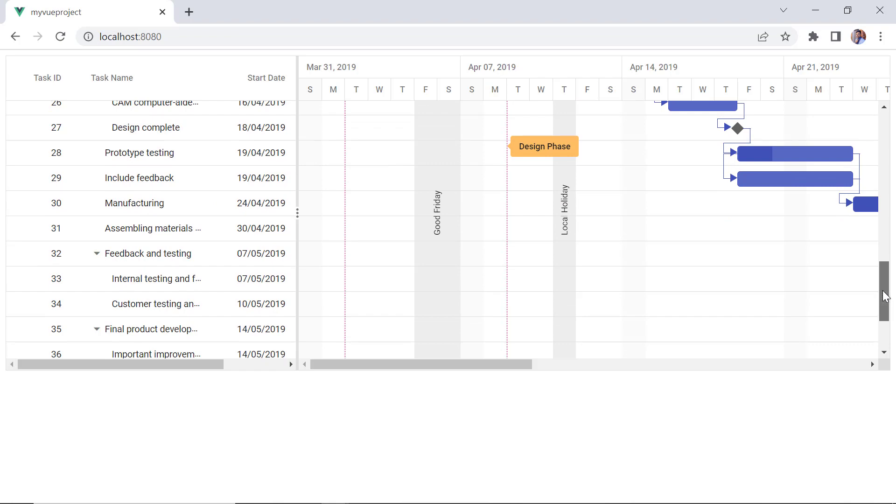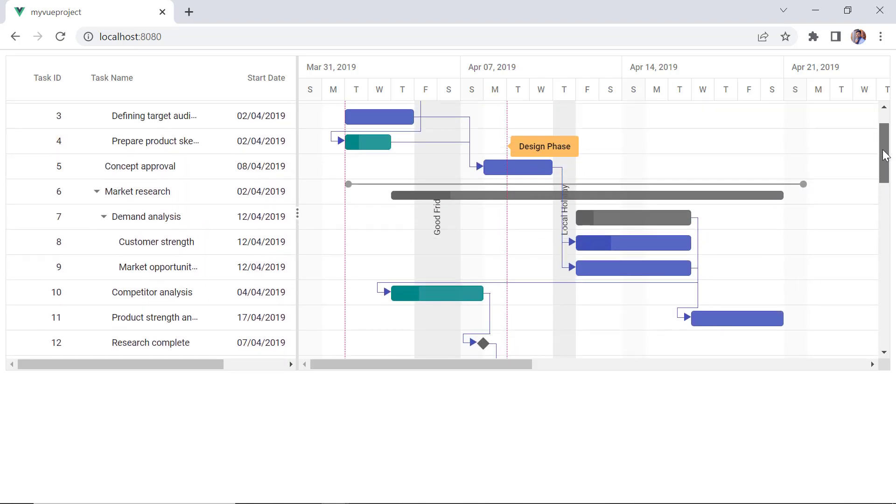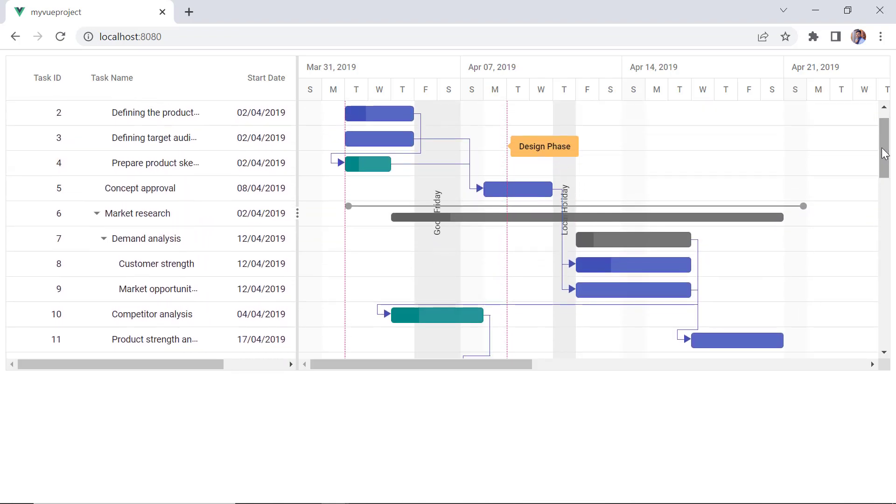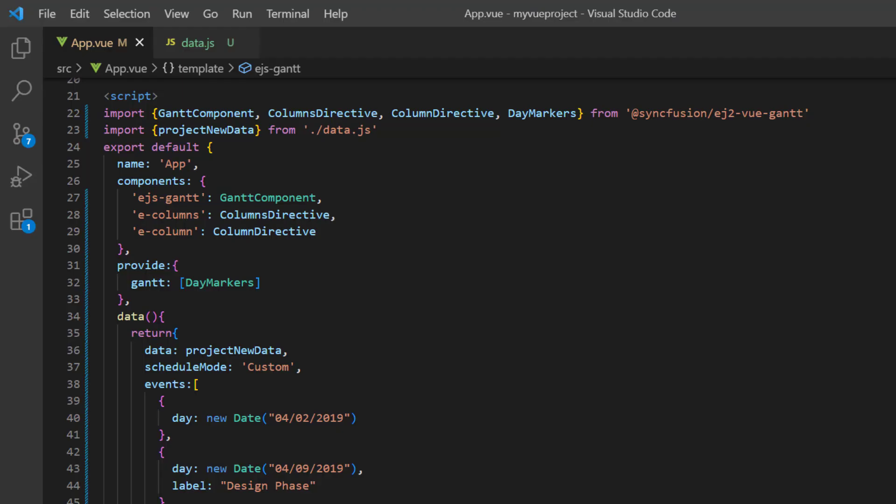Next, I will show you how to render a Gantt chart with critical paths. A critical path is a series of tasks, or sometimes only a single task, that controls the calculated finish date of the project. If a task in a critical path is delayed, then the entire project will be delayed.